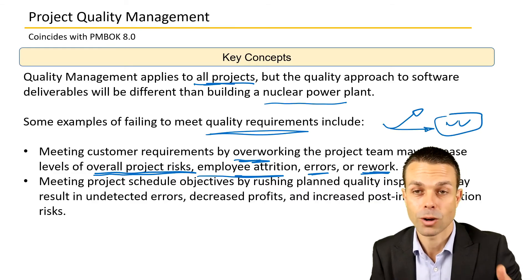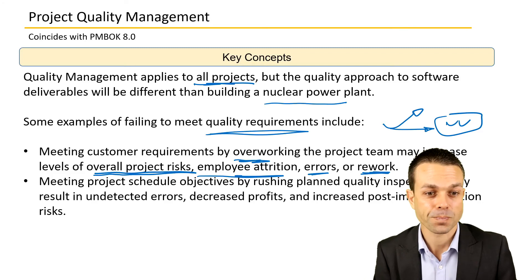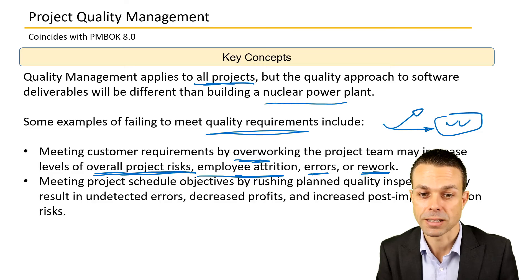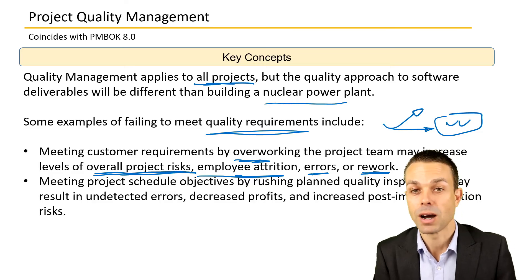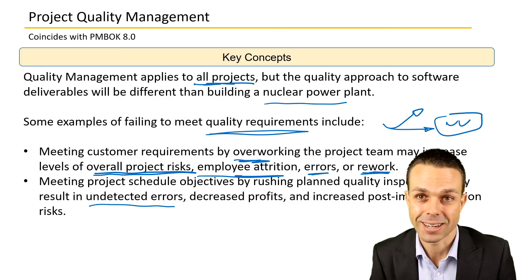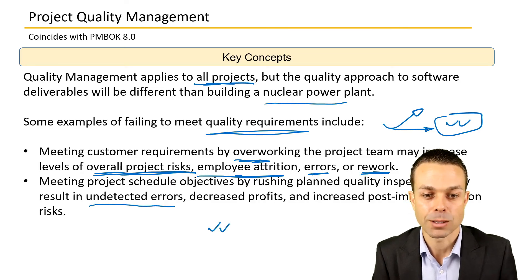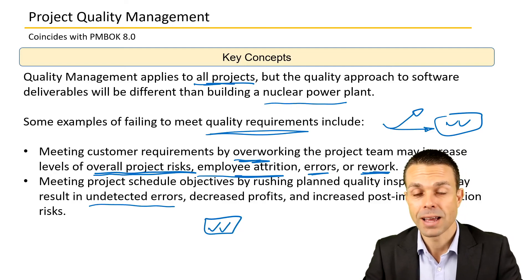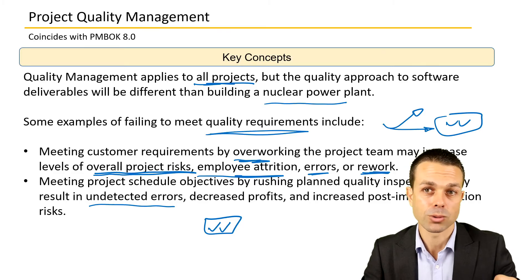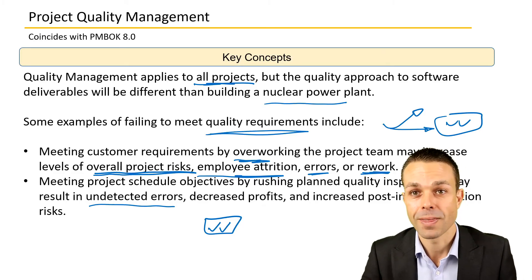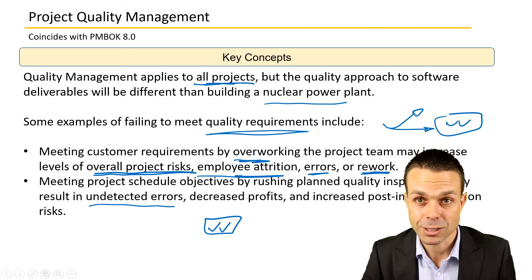Meeting project schedule objectives by rushing planned quality inspections might result in undetected errors. Don't skimp on the quality management process. Make sure you are testing properly — at the very least, do a risk-based approach, testing those high-risk items, and go through to make sure the entire deliverable is fit for purpose. That's going to give you the best outcome from the customer's point of view.